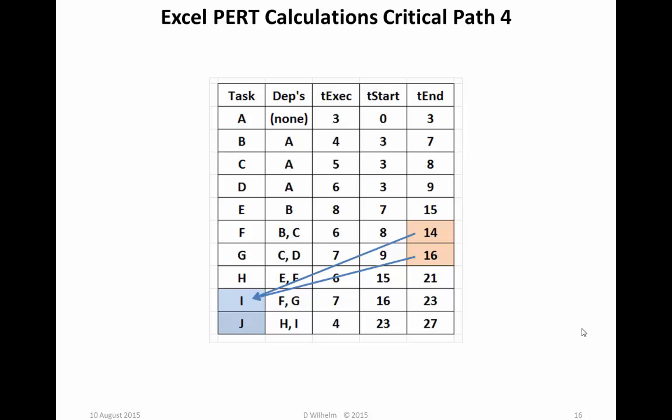Task I's dependencies are F and G. Task G, time end is 16. Task F, time end is 14. So task G is also on the critical path. Task G's dependencies are C and D. Time end for D is 9. So task D is also on the critical path. Task D is dependent only on A. So A is also on the critical path. So our critical path is A, D, G, I, J. And if we click back to the pictorial version, it agrees. So that's always a bit of a relief when something new agrees with something we have done previously.